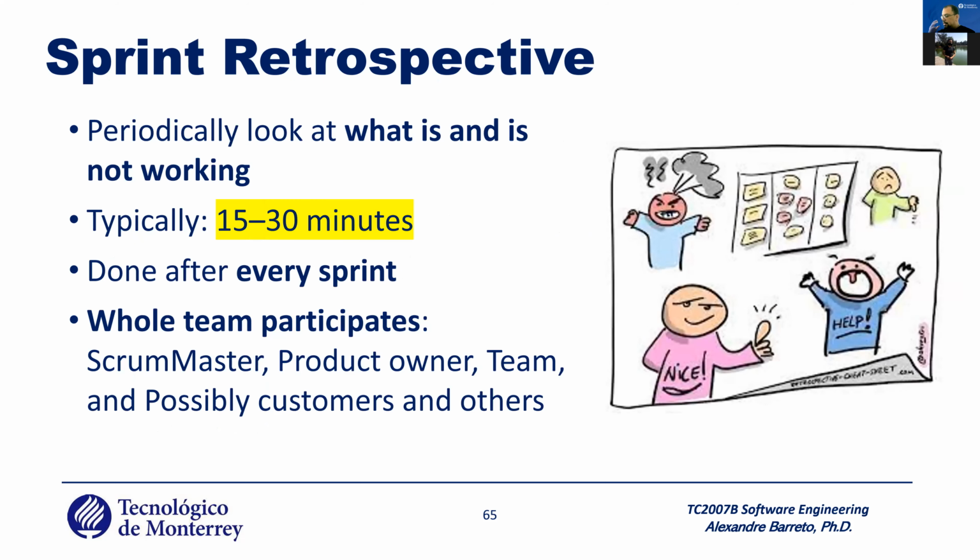Another meeting after the daily meeting is the sprint review, which you can spend, for example, 2 hours, 3 hours. There is no fixed time. It depends, okay? There are sprint reviews that are very quick, very short. The PO sees the demo presentation and says, oh, everything's good, I'm happy with the work. But there are cases where the PO says, oh, I like it, but you need to fix this problem. I saw the report, I didn't like the report. Okay, it's the time to receive feedback.